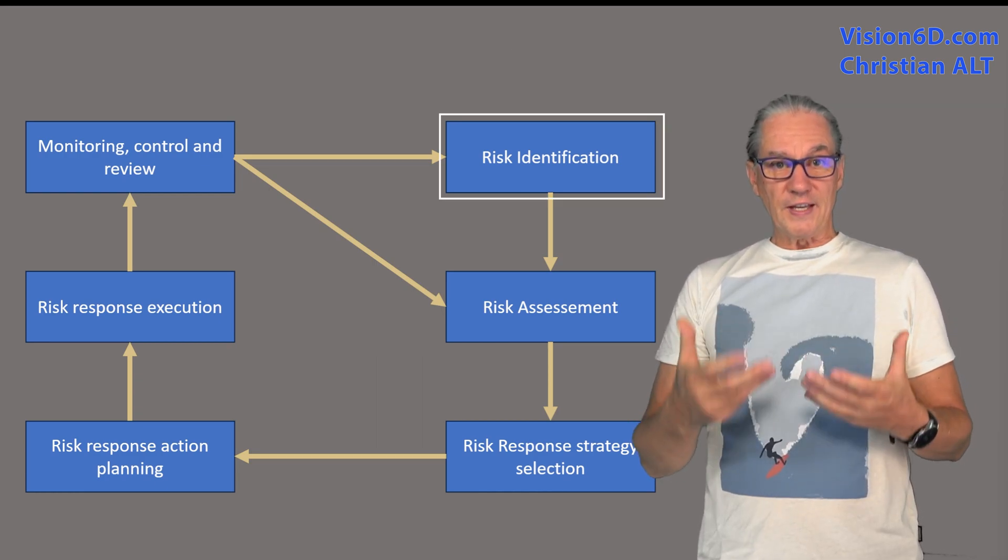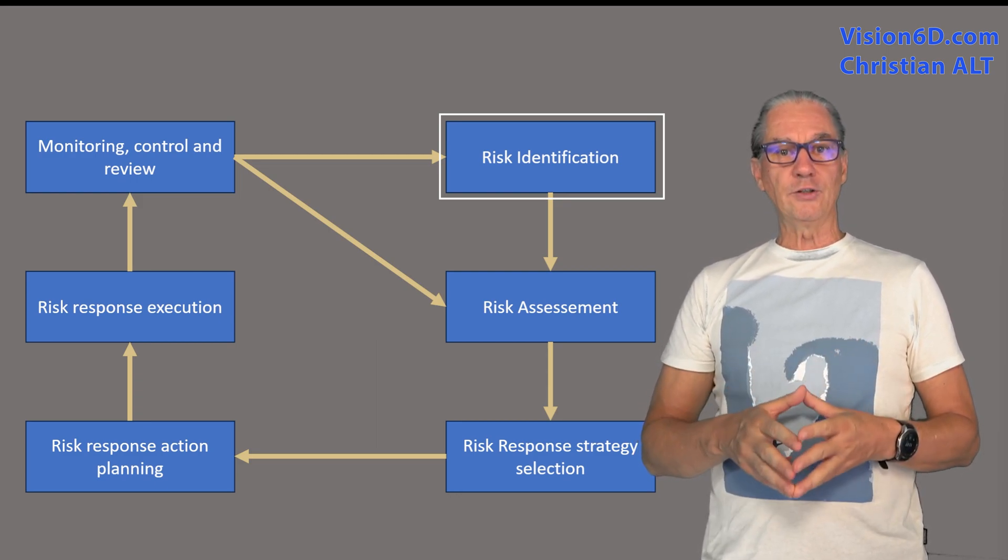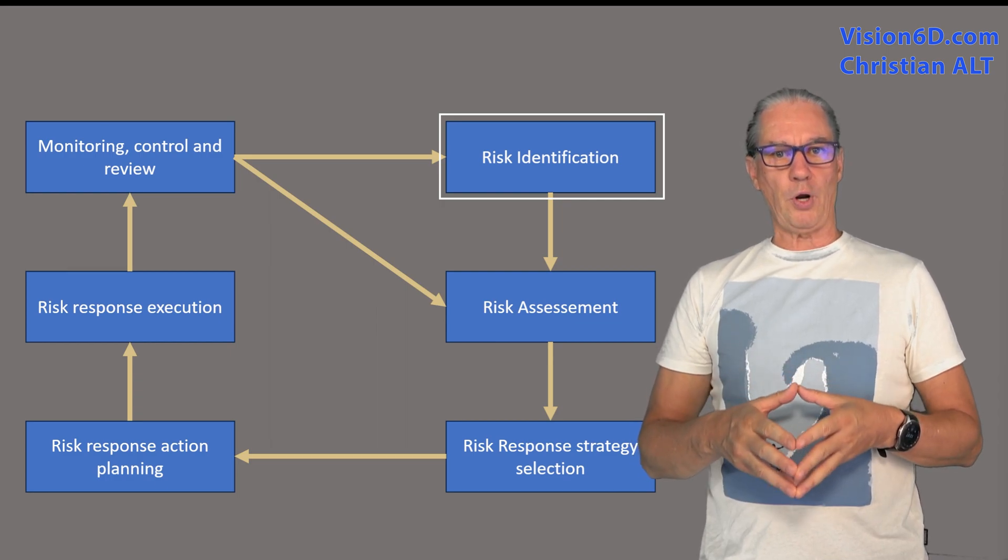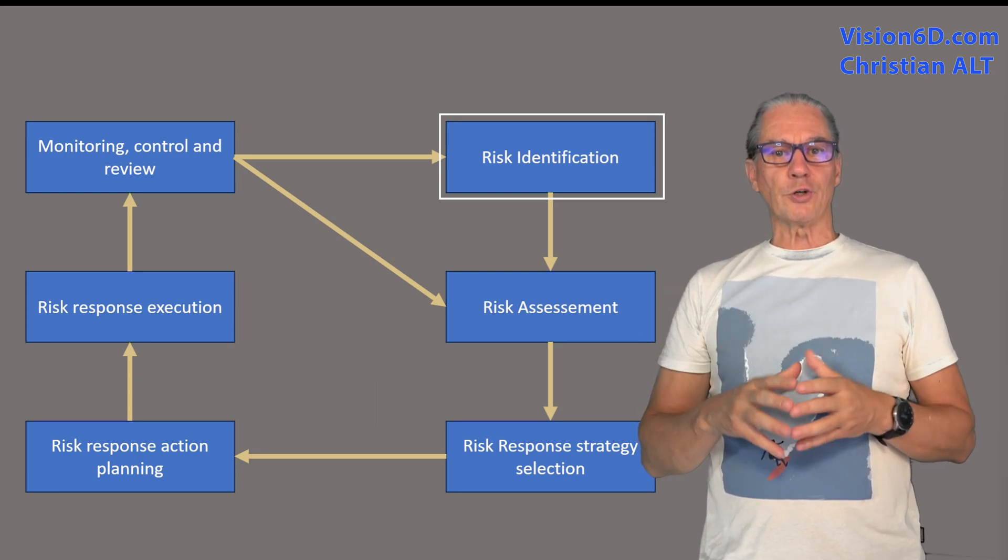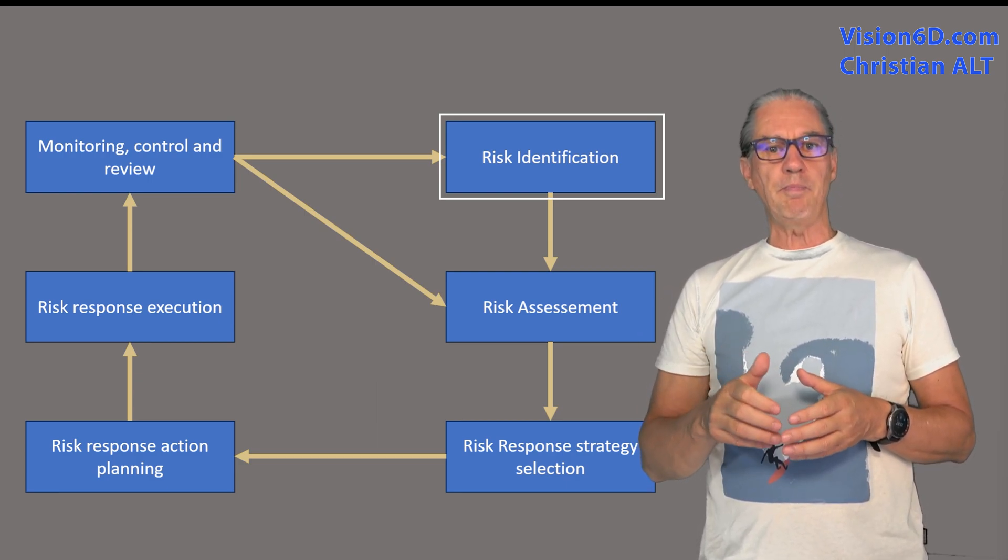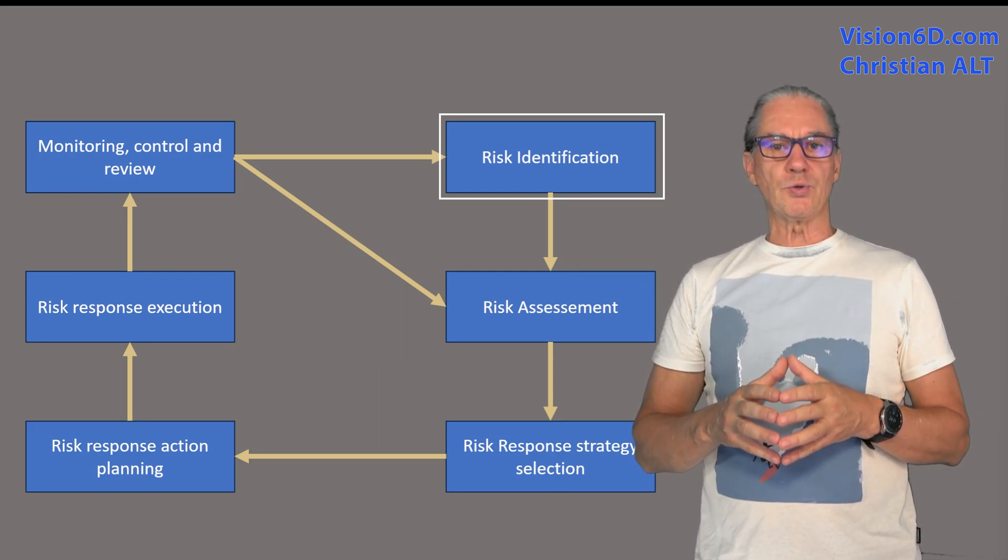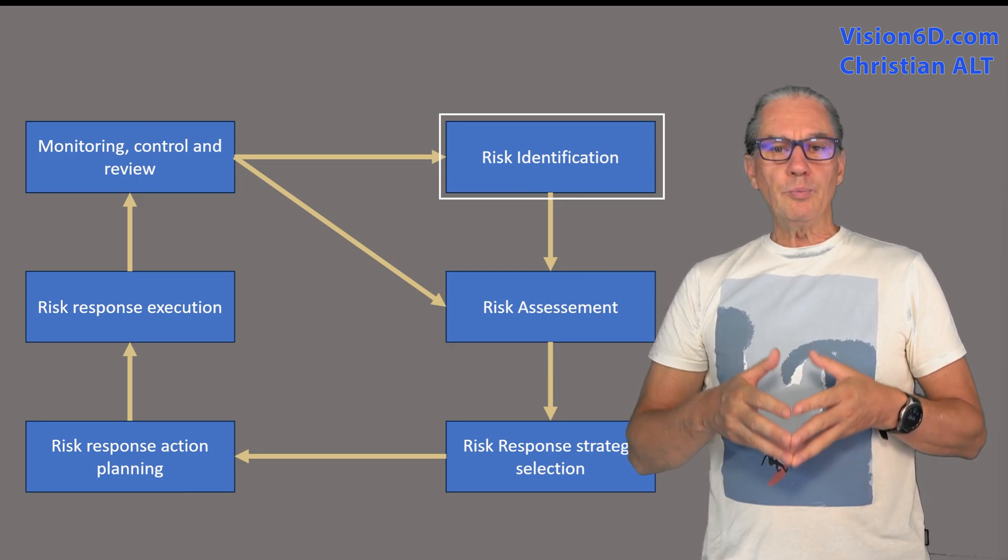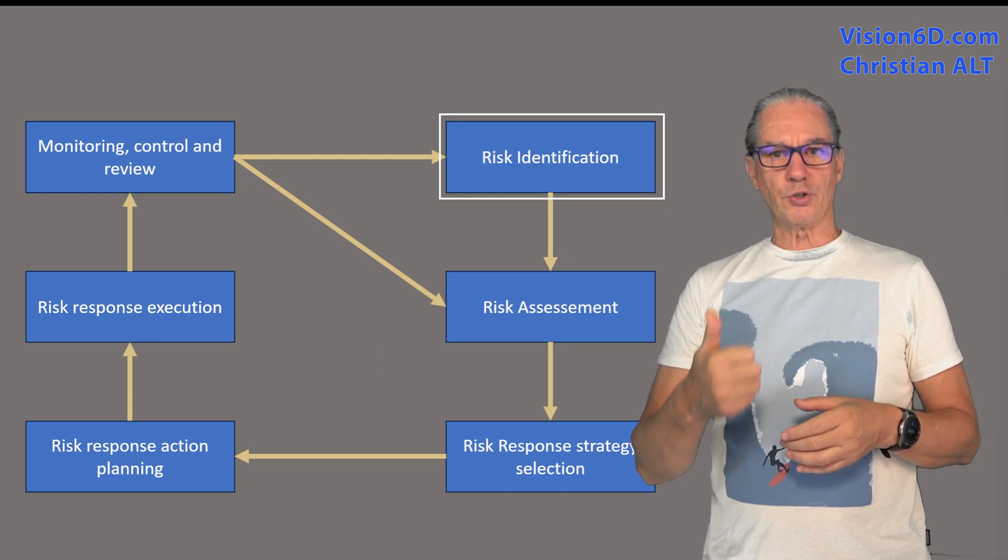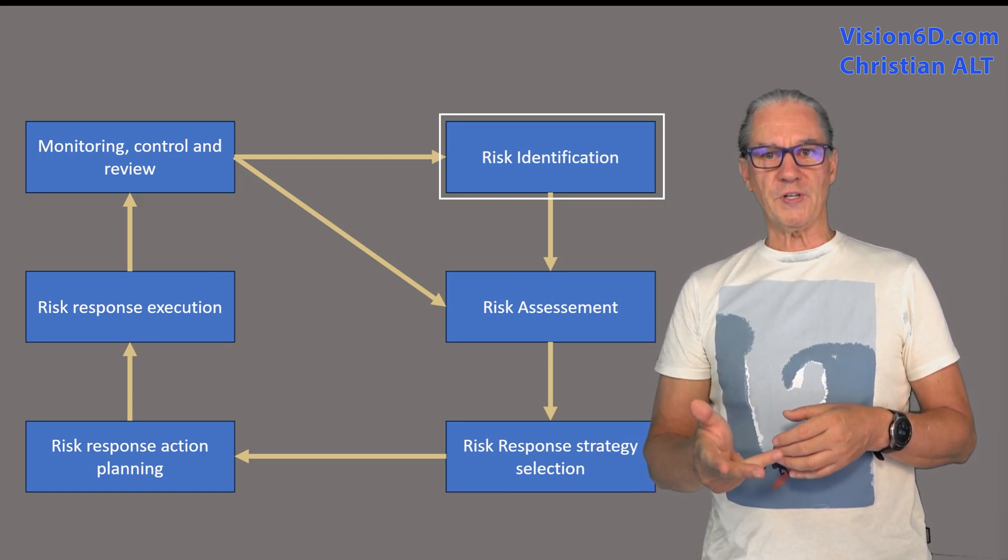The first step is to identify the risks and to evaluate their impact on the project. The best to do that is to have a brainstorming meeting with the stakeholders, the team members and SMEs, that is to say, special matter experts. We will brainstorm the potential risks considering the scope, the planning, the schedule, resources, technology and all external factors.